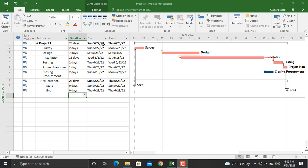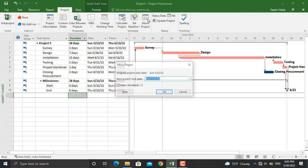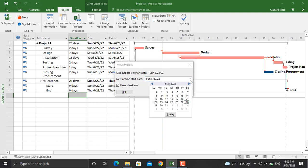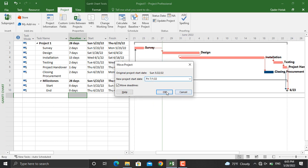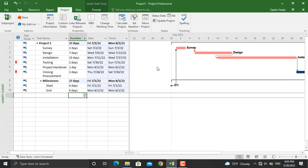To do that, you go to Project, Move Project, and from here you assign a new project start date. Let's select the date from here: 1st July 2022. Click OK and your whole project will move forward to 1st July.